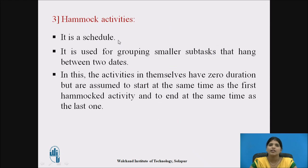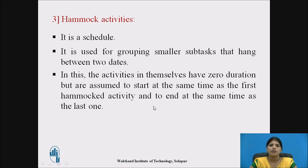The third method is hammock activities. A hammock activity is a schedule or project term used for grouping smaller subtasks that hang between two dates. The activities in themselves have zero duration, but we assume them to start at the same time as the first hammock activity and to end at the same time as the last one.